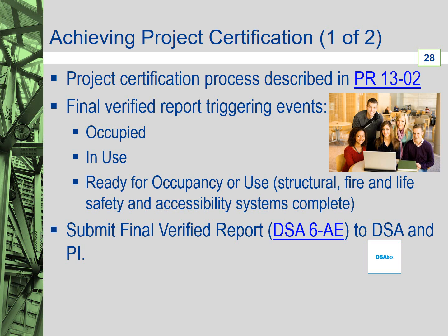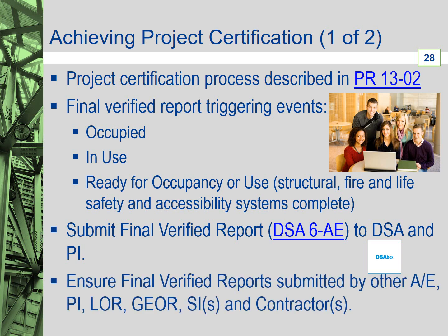The design professional shall ensure final verified reports are submitted to DSA by other applicable architects and engineers, project inspector, laboratory of record, geotechnical engineer of record, independent special inspectors hired directly by the school district, and contractors.